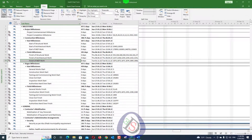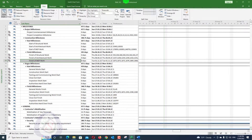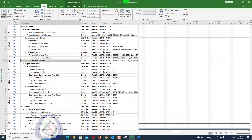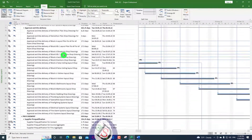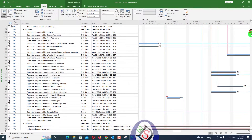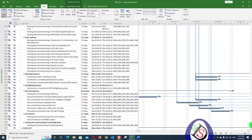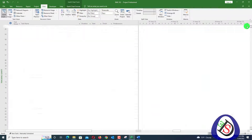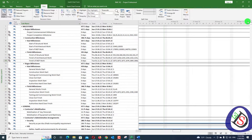In today's video, I will show you how to filter out driving predecessors in Microsoft Project. We can create a macro to filter activities based on the Task Path function. First, let's look at our project — this project has more than 1800 activities, as you can see by scrolling down.